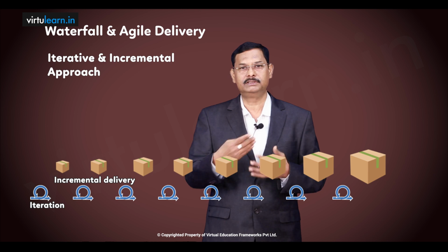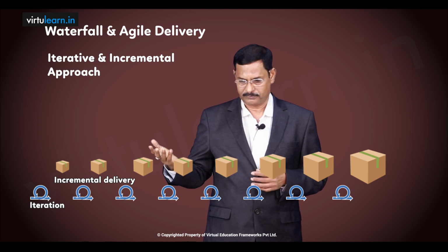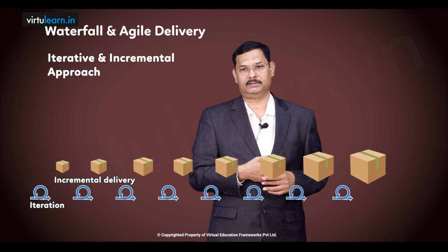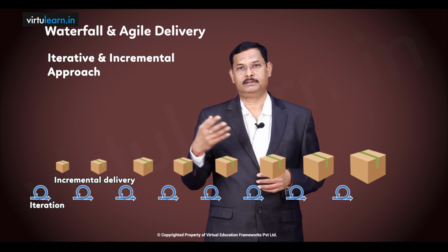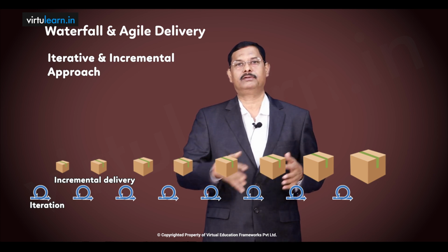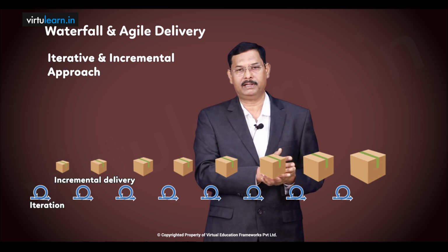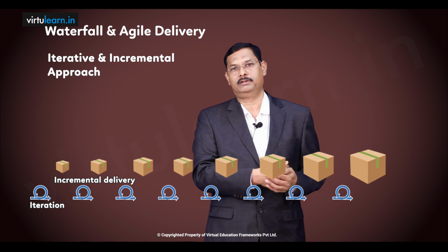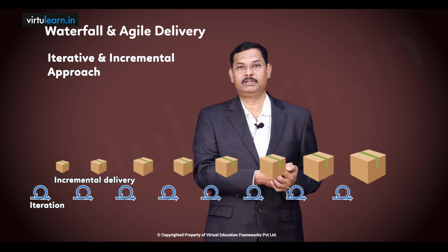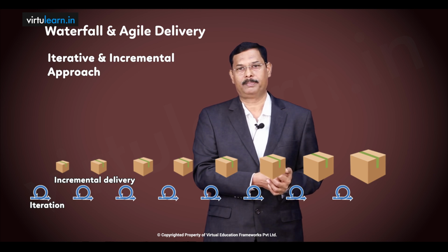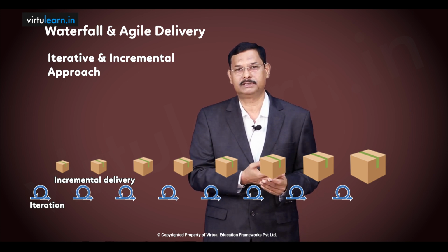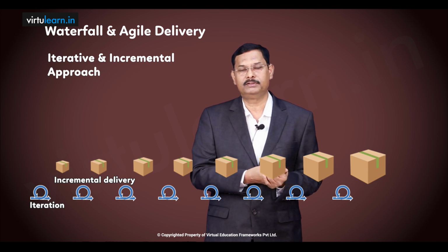The advantage with this model, the agile model, is that feedback comes at the end of each of these iterations. We can incorporate that feedback into the next coming iteration in planning, in our execution, in our thinking and behavior, in our innovation and creativity, and improve the product throughout the development. That is the biggest advantage of agile delivery, which most organizations are really reaping the benefits of.